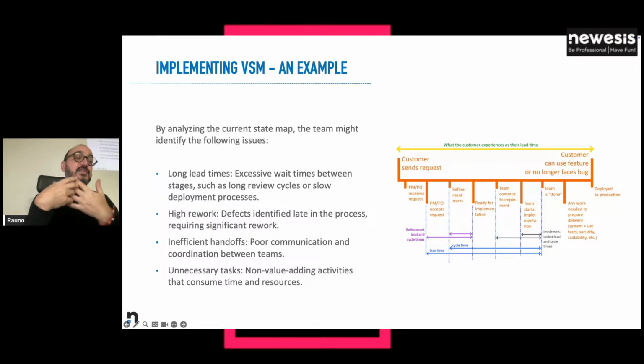You can have something that is more implicit. You can define, for example, a process where things go through your stakeholder for them to sign off, but in the meantime, you start putting them in the backlog without waiting for them to complete the sign-off, and set up a rule that everything is accepted and so inserted in the backlog unless they explicitly deny something.